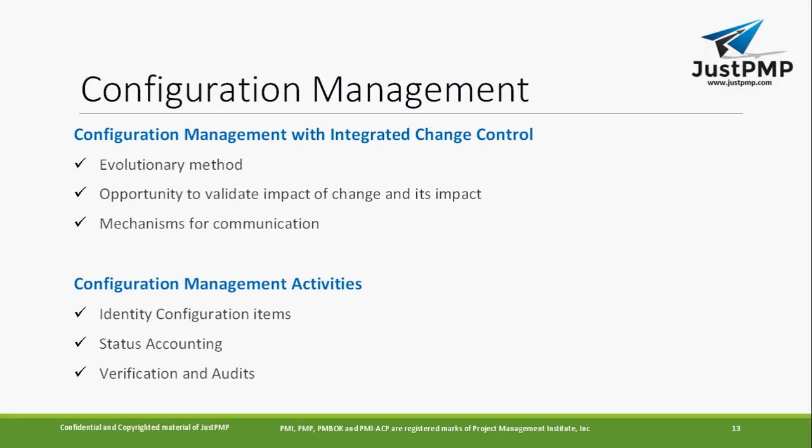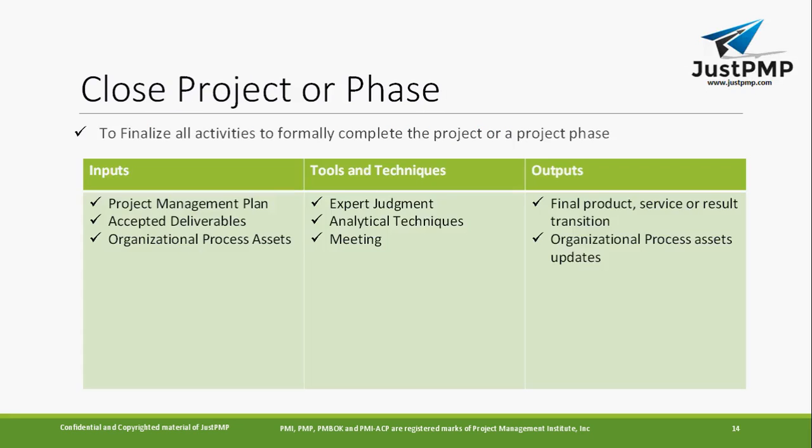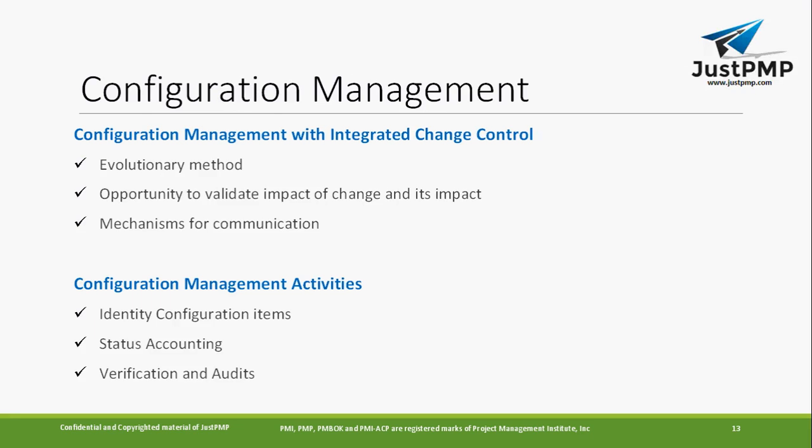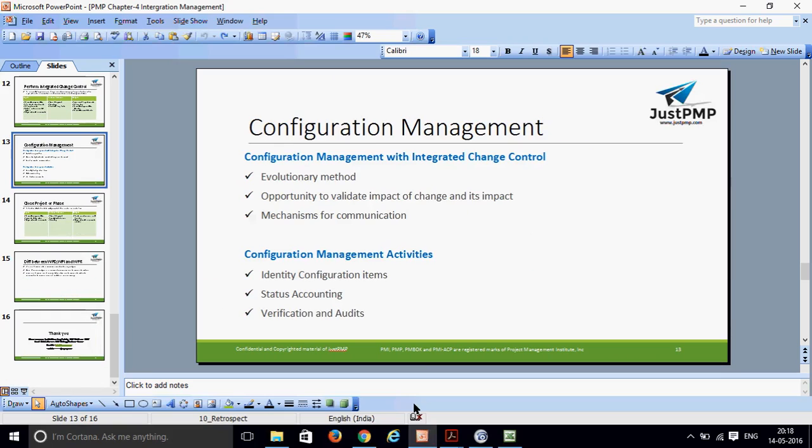Let me give you an example. In this case, the configuration management activities to note down are: identify configuration items, status accounting, verification, and audit.